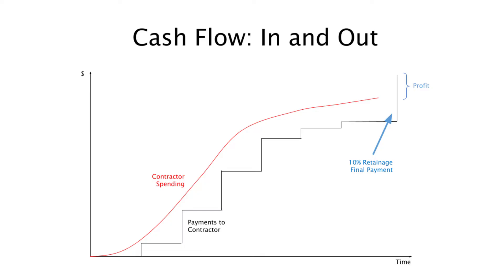Usually by the end of the cycle, the contractor adds up all the amounts that he indeed performed—he or his subcontractors—and submits that list to the owner: actual quantities multiplied by unit price. That unit price is part of the contract documents, called schedule of values. In some areas of the world, they call it bill of quantities. Every month, the owner reimburses the contractor. However, there are two problems with the reimbursement of the owner. One problem is that it lags behind. The contractor spends over a month, and then the owner takes about four weeks or six weeks to verify that those quantities were indeed done, do the math, review the unit prices, and then issue a payment.